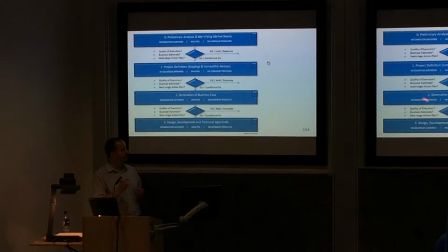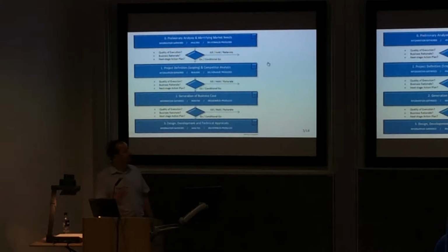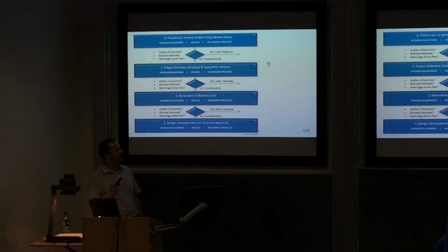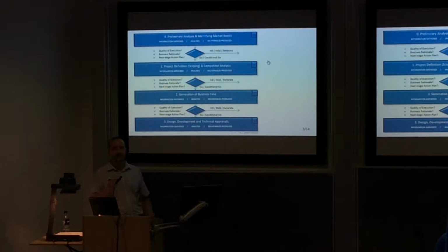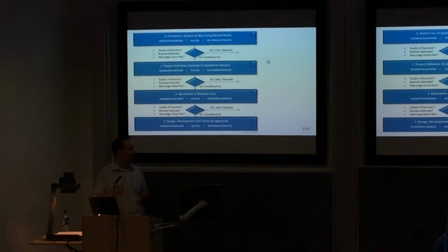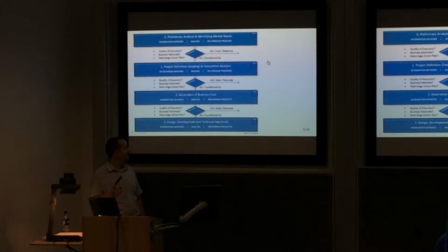and this is the one where a lot of the senior managers will be reading and deciding whether you continue or not. Again, you make a decision, do you carry on to the next stage? Usually at this case it's not the individual in the R&D that's making the decision, this is the senior management team or the R&D committee or a forum of that nature. It continues and you're allowed to start going into the design, the development and the technical appraisal.